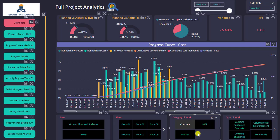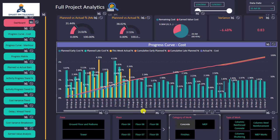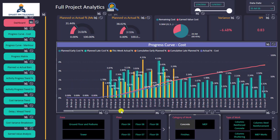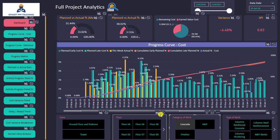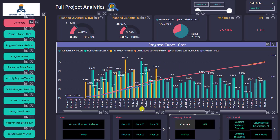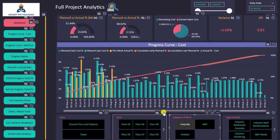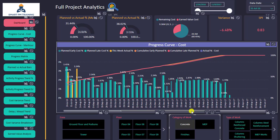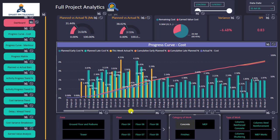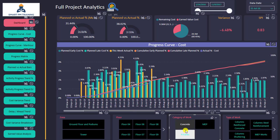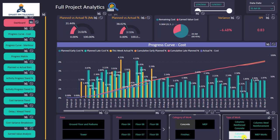In this case, I consider concrete as a separate project with its own contract value and timeline. The progress curve is generated immediately with one click. I can see the percentages for concrete work only, as well as the cumulative for concrete and the timeline — so now I have laser-focused analysis of concrete activities.